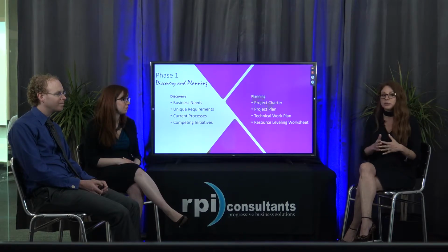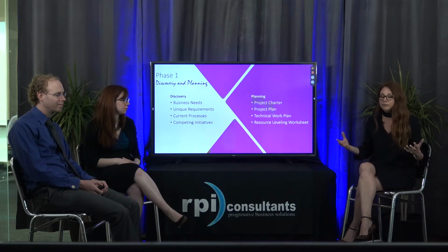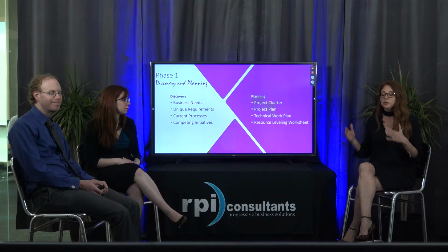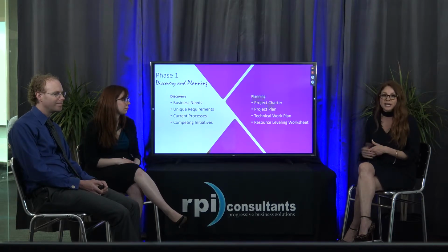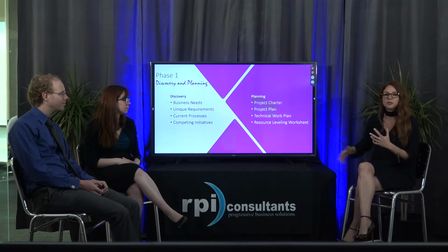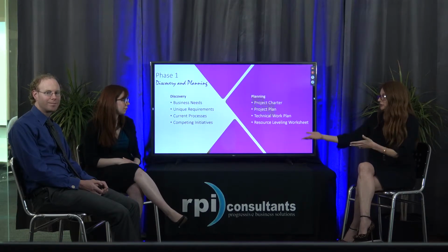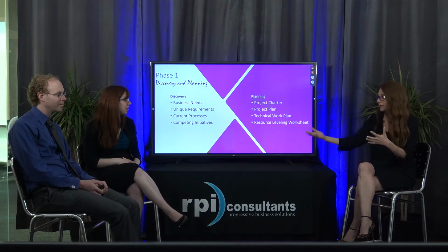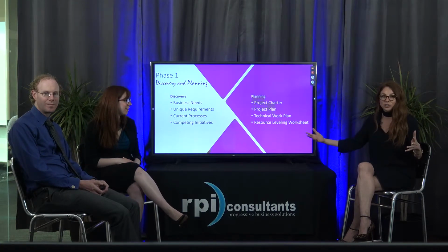Same thing with your IT department. If you're in healthcare and you're going through a big Epic upgrade or Cerner, those same IT resources that you'll need to support you will not be available to support the HR initiative. So those initiatives will come out, and all that goes into the project planning document and that timeline to determine how this project's going to play out.